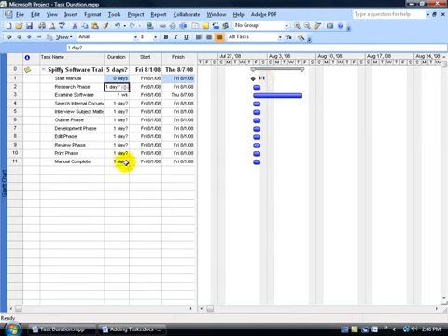By the same token, another major milestone or point in the project is completing it, so I can type in 0 for the manual complete. So now I have 2. Now you can have milestones throughout the project here. You can have them in between these tasks, another black diamond, that when you hit that you can say, okay, here's a milestone, this is big, let's go ahead and celebrate, or let's get ready for the second phase.